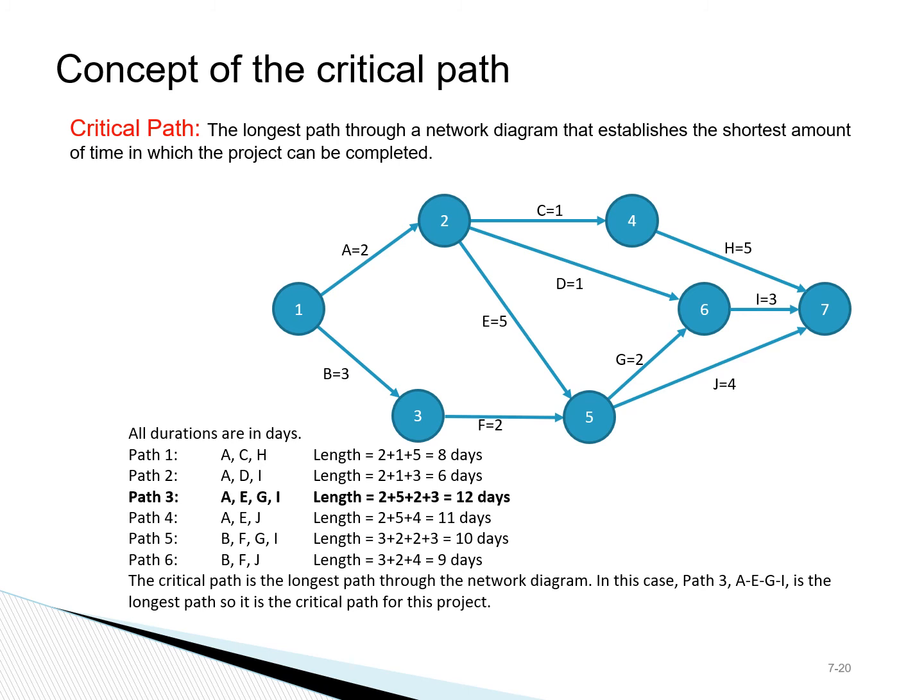We have talked about critical path in the past, and one of the scheduling techniques is, of course, to determine the critical path, which is defined as the longest path through a network that establishes the shortest time that the project can get done.